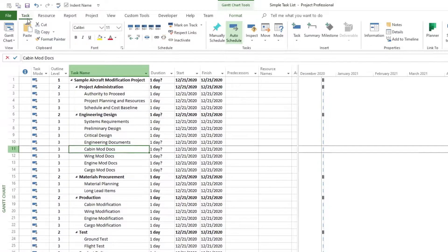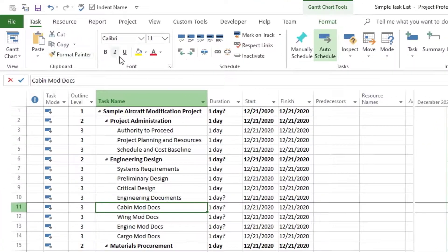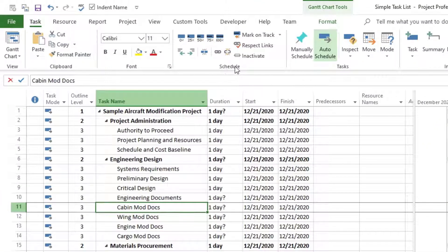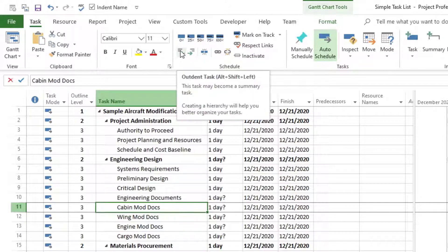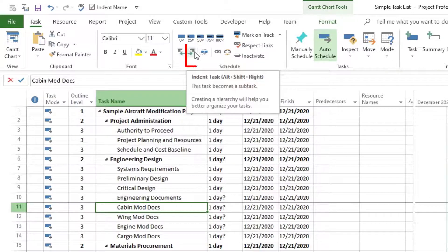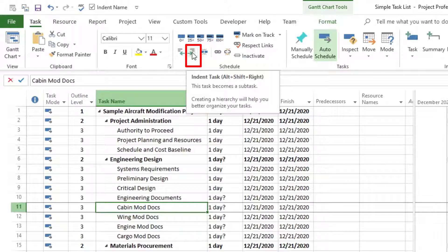So to do that, now we go to the tab task, and then we go to the schedule section of the tab. And then right here, we have the outdent task and the indent task. If I hover over it, it says indent task. You can use Alt plus Shift plus Right on your keyboard to indent it quickly as a shortcut.